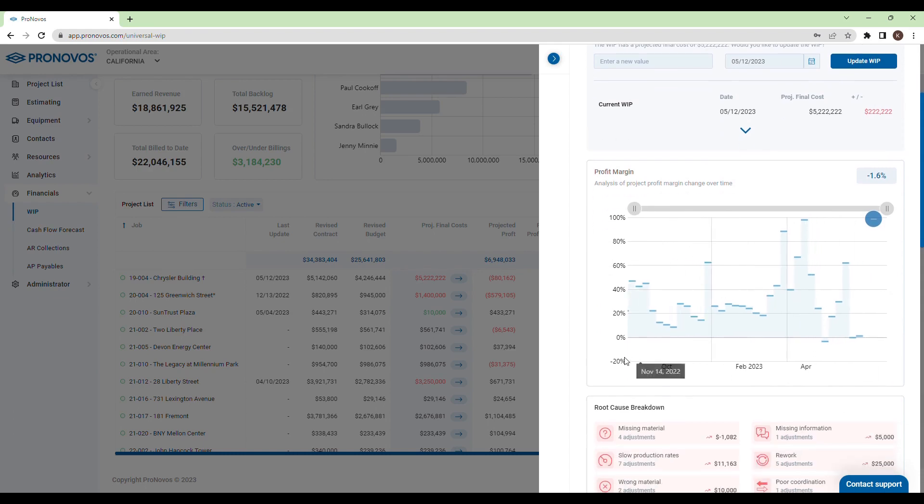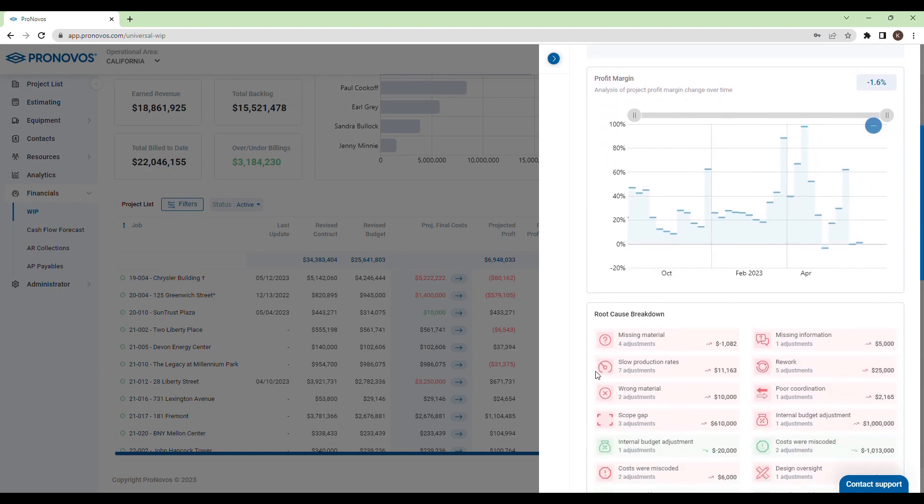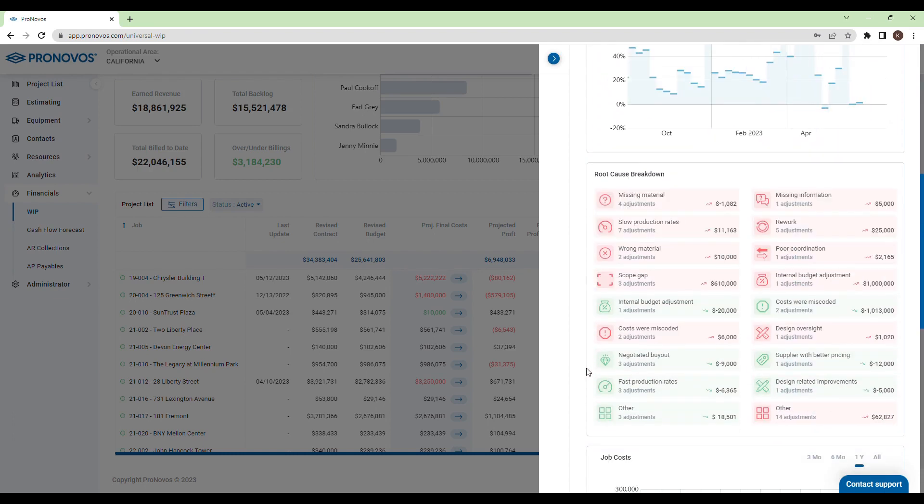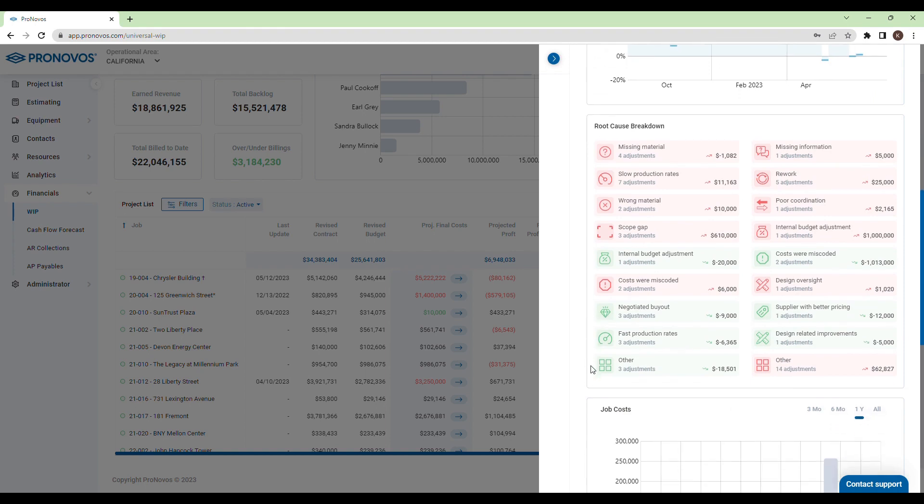As project managers update their projects, the root cause of adjustments flows into the WIP, providing you with insights into what led to savings and busts on the project.